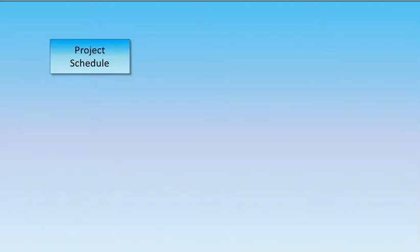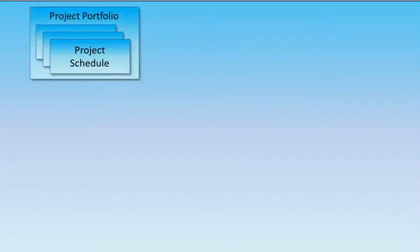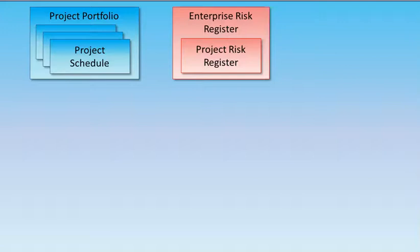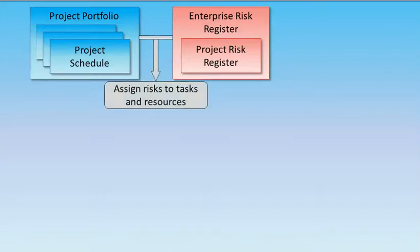In RiskyProject, risks can be managed either at the project or project portfolio level. Each project has a risk register. If you are managing more than one project, they can be part of an enterprise risk register. The project risk registers include all information about risks that could affect the project. Once risks have been identified and added to the risk registers, they can be assigned to a project's tasks or resources.